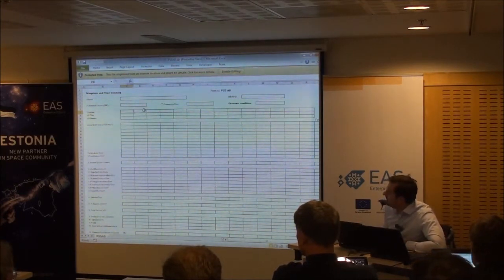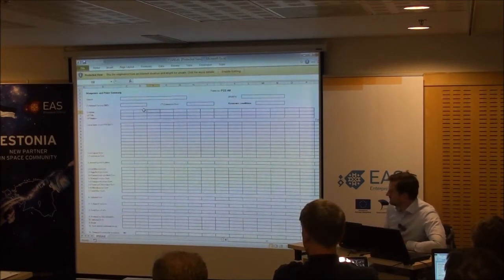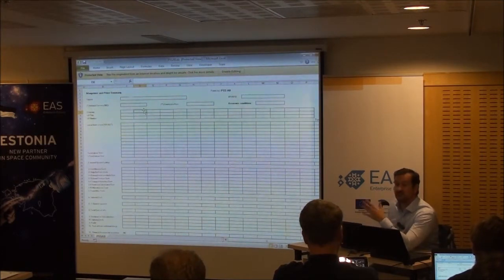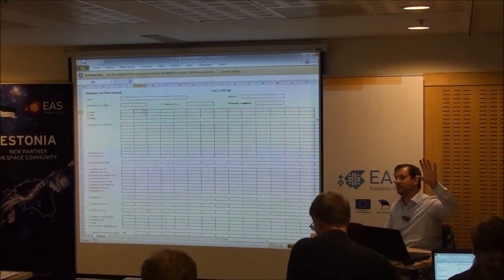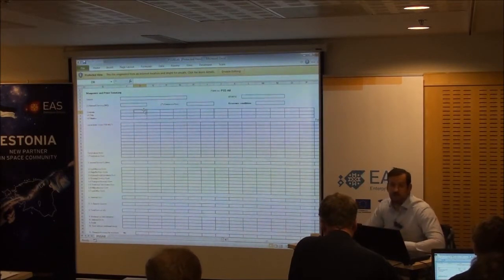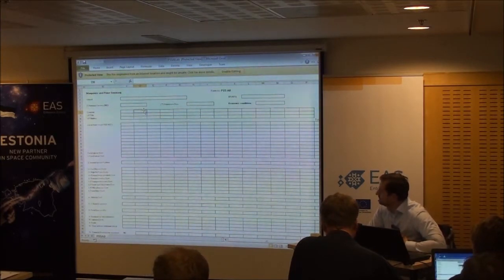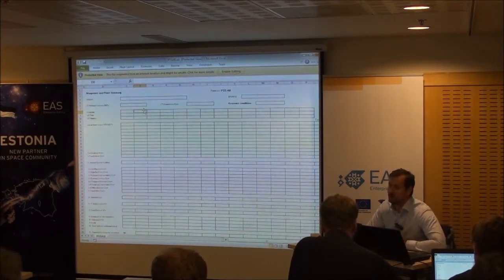Okay. So you can amalgamate the companies here and put them all on one sheet, but we tend not to do that. We tend to have one per subcontractor, because it's just nice and clear then what their bit is, what your bit is, and you can create a summary sheet in the document itself. Just a simple table that may be coloured, and you show very simply which company's doing what, and you colour code them or something like that. And then we have one of these per company. It's just nice and clear. You can get them all signed, and there can be no tampering, no excuse to discuss later.